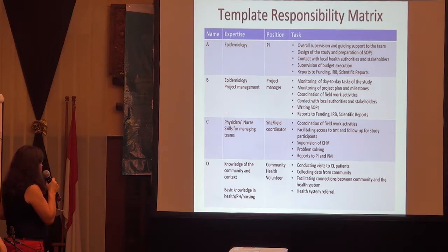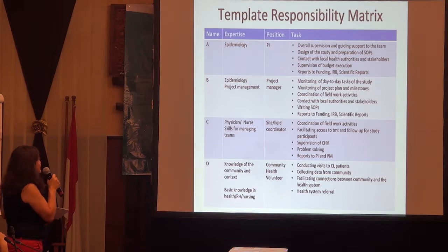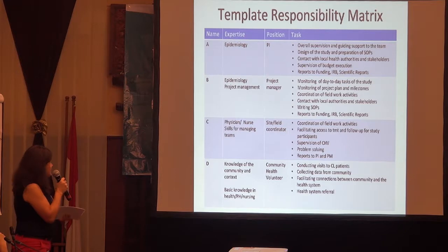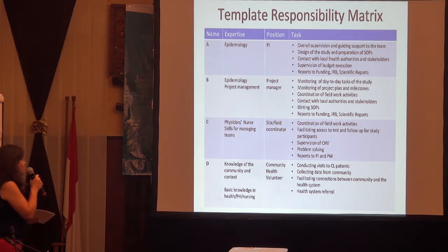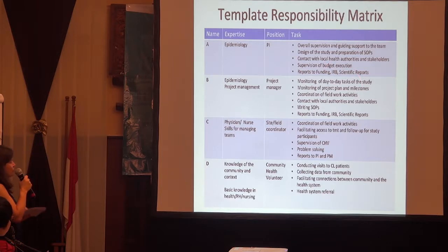The project manager, which is Mari, in one of the sites, she also has to do the monitoring of day-to-day tasks of the study, the monitoring of the project plan and the milestones, the coordination of the fieldwork activities, contact with local authorities and other stakeholders, writing the SOPs, and also is in charge with the PI of the different reports.